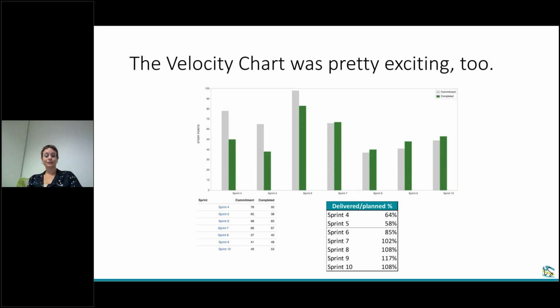All right. For people just getting started with Jira, we're wondering, for data to show up on these reports, what are some of the fields or areas people need to enter in the epics and stories so Jira can report on it? For the sprint report and the velocity chart, what's in your epic is not going to matter. You don't want to put your epics in sprints because they will mess up this data.